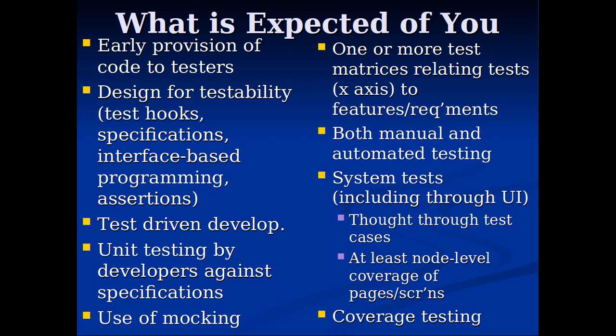So I did request a freeze date. Freeze early, a few days ahead, so testers can get code. That doesn't mean the code can't have bug fixes in it, fix oversights and so on, but it should be basically feature complete so the testers can do meaningful testing on it. Because if you don't test it, I will. If you test it, I will also test it. But we will make sure that it is tested.